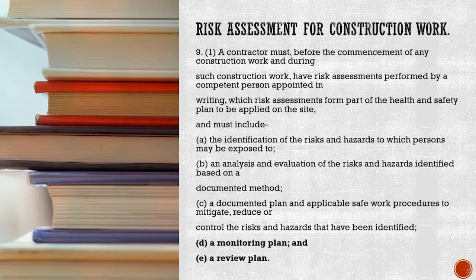Now, as we mentioned, we are discussing the construction regulation when it comes to perhaps the Occupational Health and Safety Act. Under Section 8, it tells us that the employer is responsible for mitigating risks and hazards. Under your general safety regulations, it tells us that he needs to perform a risk assessment, and under general administrative regulations, he needs to keep records of such risk assessments. So all of this works together, and we are not specifically saying that you have to abide by either one of these regulations because it all depends on where you are working.